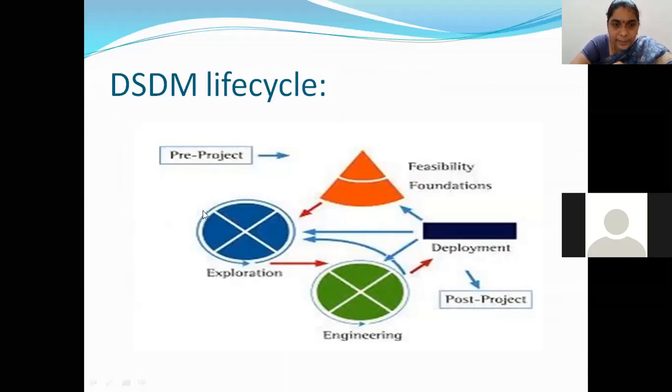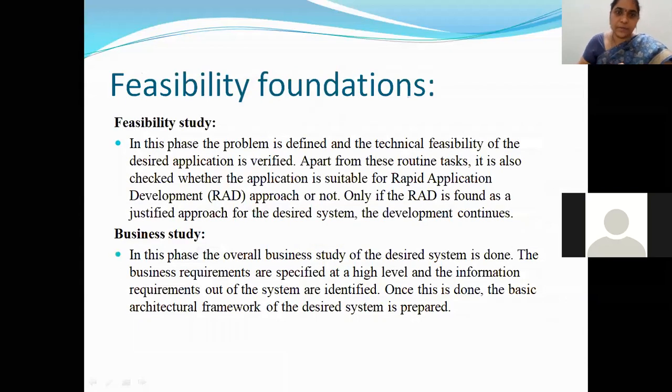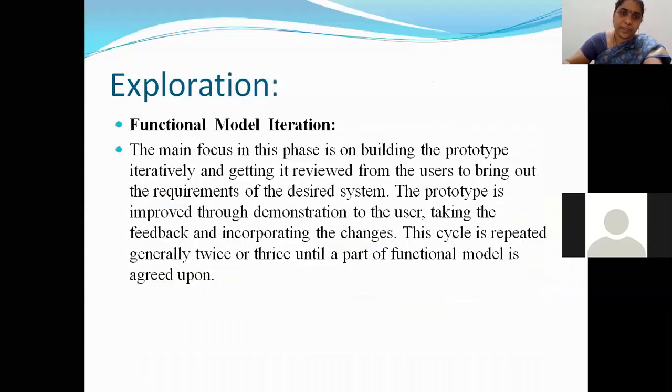And next one is exploration. Here we will be concentrating on functional modeling. So I'll also call this functional modeling. See, we call it functional model iteration or exploration. The main focus of this phase is on building the prototype iteratively and getting it reviewed by the user to bring out the requirements of the desired system.